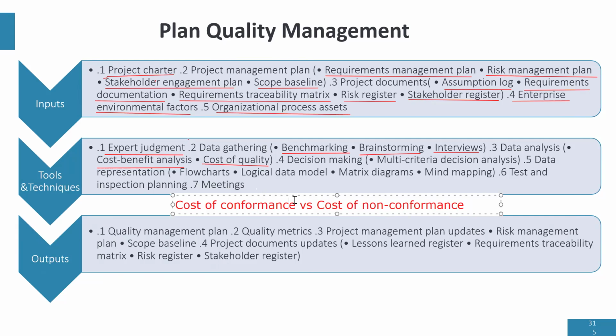Let me give a simple example. Now, someone is building a house, and that person wants a good quality house. Part of his cost of conformance would be to do a soil test, especially if it's in a particular area. So doing a soil test is part of your cost of conformance to ensure that the right foundation is used to build a house.